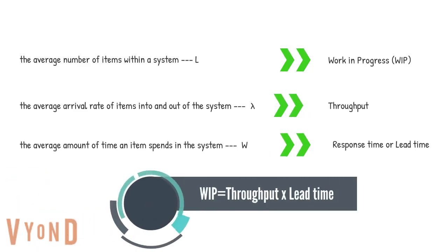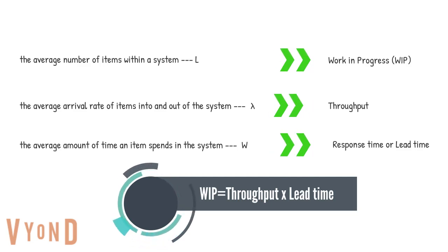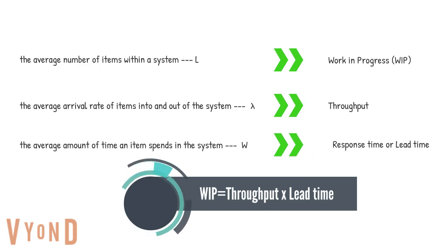Now, the formula can be presented as below: WIP equals throughput times lead time. WIP makes the lead time longer, resulting in slower task completion. Also, if the other two variables are given, we can figure out the third one. Because of that, Little's Law formula can show you how to optimize the workflow and productivity.